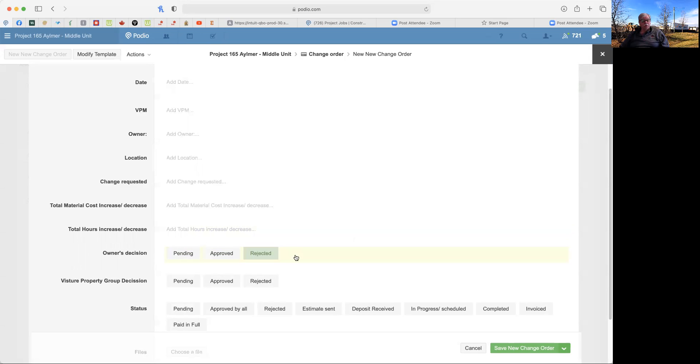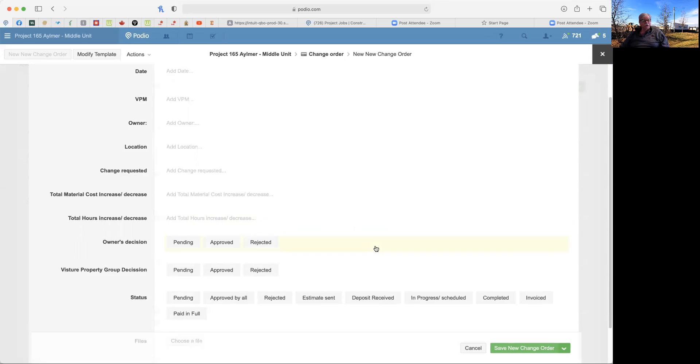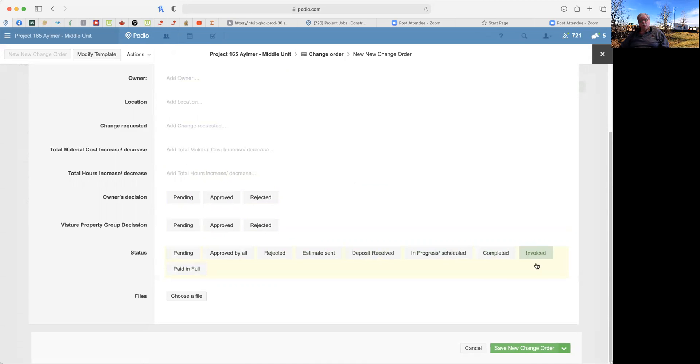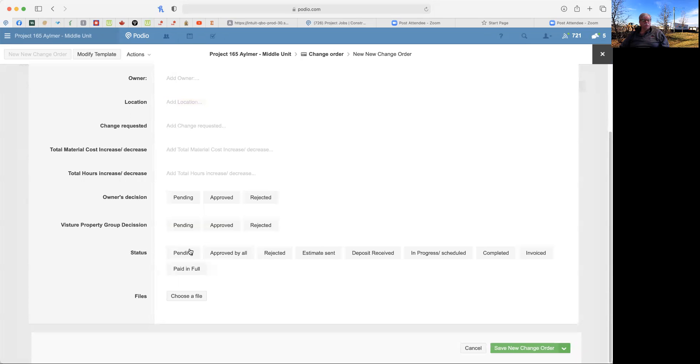And from there, the owner will either approve, it's either pending, approved, or rejected. And then we will do the same here. And then when there's a change order, we can completely track the status of that change order to know exactly where we're at. Most of this for the owner, you will review it, but your main part will be to approve and reject it here.